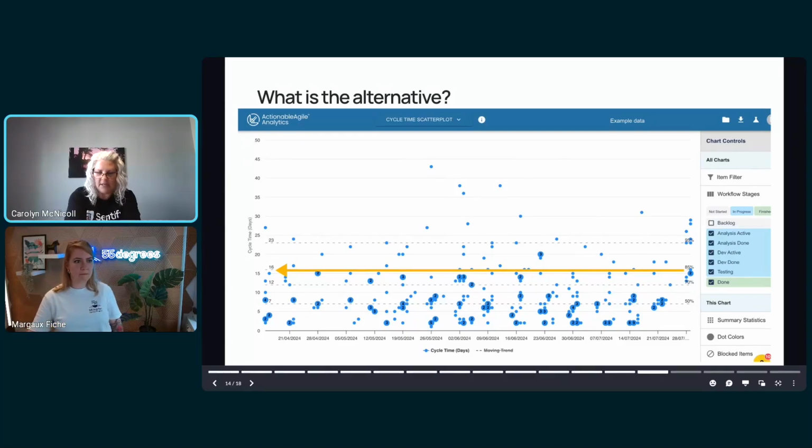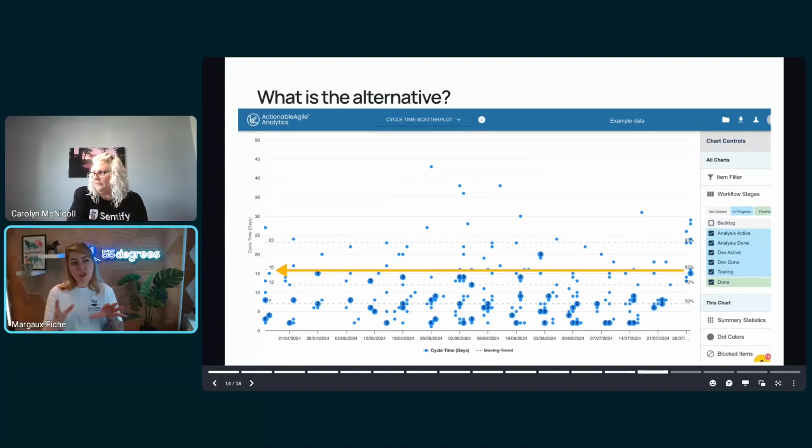less than 23 days. That's better than our previous example where we were looking at a range between 1 and 72 days. So if I could tell a customer that I have high confidence that we can get your work done in 23 days or less, that's going to be much more accurate, and they're going to be much happier than saying, I don't know, it could take somewhere between 1 and 72 days. I can't really say for sure. Exactly. But here, at least you can trust the forecast.